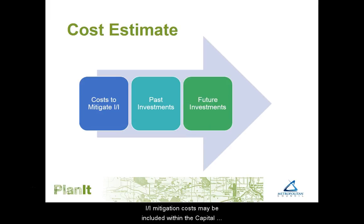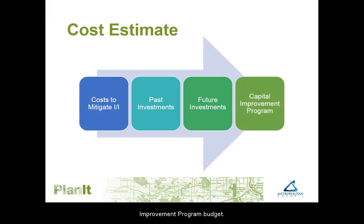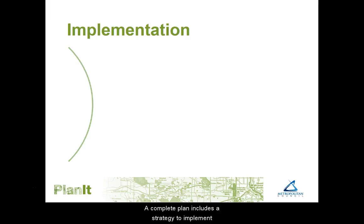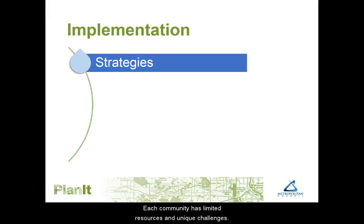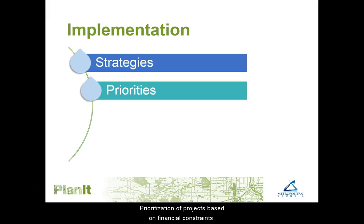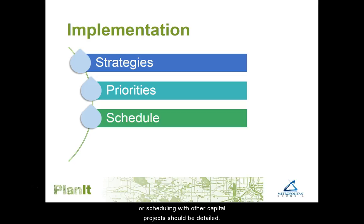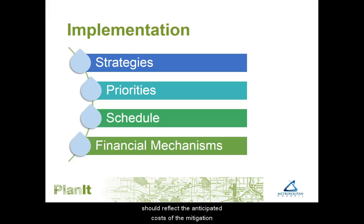I&I mitigation costs may be included within the Capital Improvement Program budget. If this approach is used, please refer to the program or budget within the text of the wastewater plan. A complete plan includes a strategy to implement corrective actions to mitigate I&I based on the findings of the system analysis. Each community has limited resources and unique challenges. Prioritization of projects based on financial constraints, effect on flow reduction, or scheduling with other capital projects should be detailed. The funding sources and amounts should reflect the anticipated costs of the mitigation projects detailed in the cost estimate.